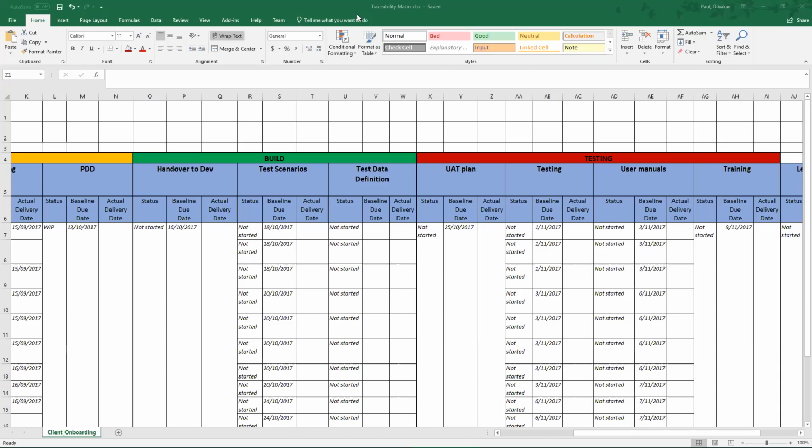Whenever you are going for a review of the project, you might have scrum calls, delivery meetings, or session meetings to check the updates, where you are tracking whether the requirements are in line, and the developers are not developing something different. All stakeholders will be available, right? Based on that, you just update it at the back end. This is the development that is happening today, 30% complete, base deadline is this, actual deadline is this. So every update that you receive at each and every phase of your solution build and testing, you just update the data accordingly and keep it for yourself.